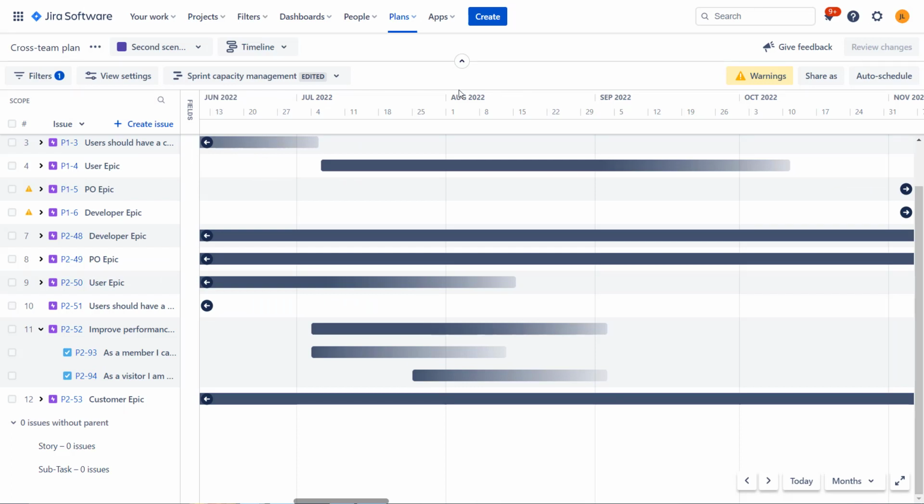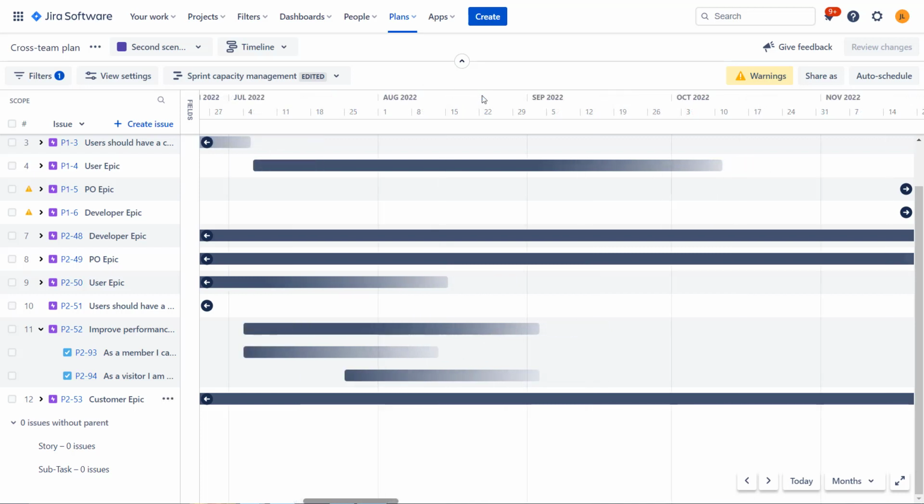Okay, so let's jump right into the feature discussion. Let's start with talking about how can we create a plan for waterfall approach here, as in my view it is a little bit easier. So usually when we have waterfall approach, we want to plan the tasks on the timeline, create them with dependencies, and see how changes in a plan made on one task will impact the other tasks, right? So let's start with simple planning tasks on the timeline.